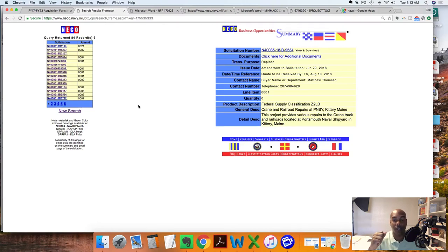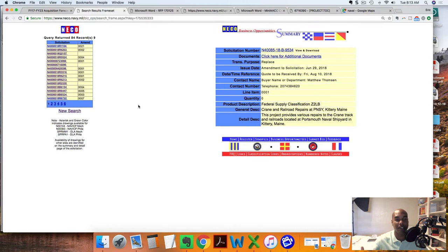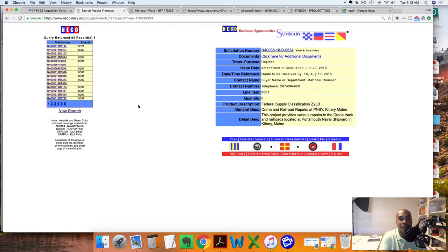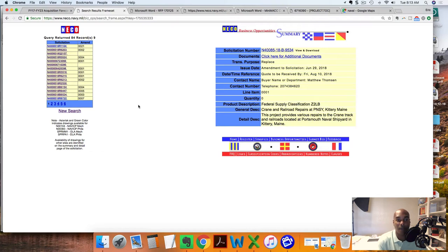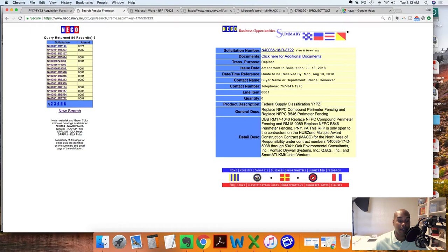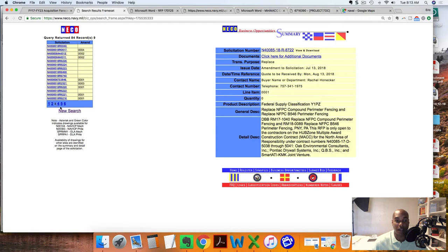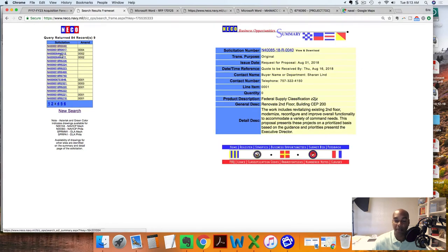A lot of times if you're saying to yourself - and I know we ran into this roadblock for my client when we're saying, well Eric, where are the jobs at for the Navy? Why aren't they posting and why are you not seeing Navy projects on FedBizOps? Because what they're doing is they're lumping all their small projects into a blanket purchase order, an IDIQ, Multiple Award Construction Contract. They're lumping it all together and then they're pre-qualifying a few companies to handle all the upcoming projects over the next five years. Very efficient way of doing so, I might say, but it seems like that's the way that they're doing contracts.